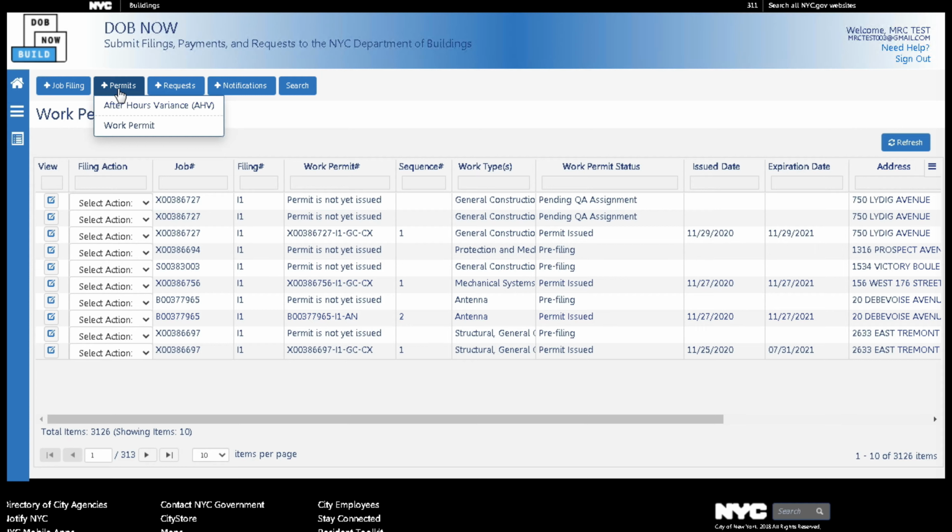the initial permit. We ask that you make this application at least 2 days before your first intended workday. It's also important to remember that the scope of the AHV permit must be related to the scope of work of the specific work permit.